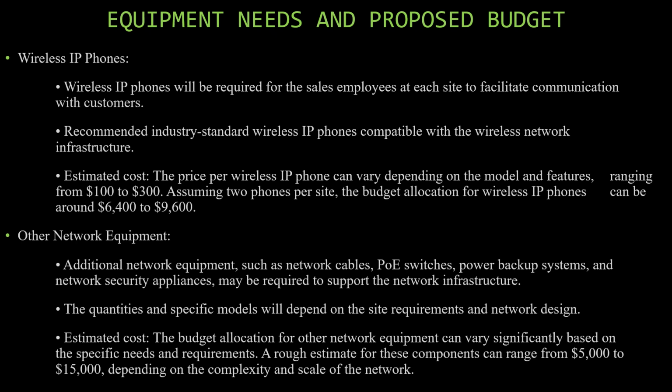Wireless IP phones will be required for the sales employees at each site to facilitate communication with customers. Recommended industry standard wireless IP phones compatible with the wireless network infrastructure. The price per wireless IP phone can vary depending on the model and features, ranging from 100 to 300. Assuming 2 phones per site, the budget for the wireless IP phones can be around 6,400 to 9,600.